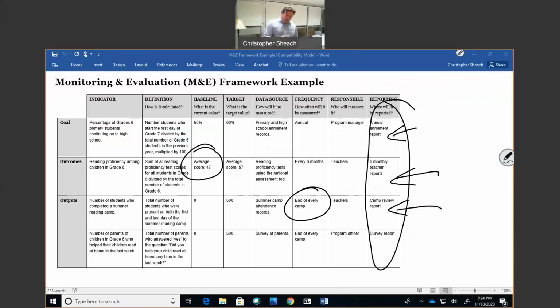If you look, you will notice these first two are exactly your log frame. If you've updated your log frame to reflect any changes in the process of project design, you can just use those first two and add more columns because everything in the log frame needs to be here. Not everything in the work breakdown structure should be here because you don't monitor everything in your work breakdown structure. You only monitor the results you're intending to get to the end of.